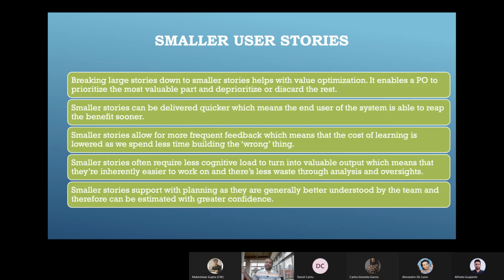If after 1 month we are delivering, and something we were doing wrong in the second or third week cannot be corrected, we need to wait for a month. But suppose on day 3 we are doing something and we are frequently releasing, every week our sprint is ending, so we are getting frequent feedback and we can adapt ourselves.